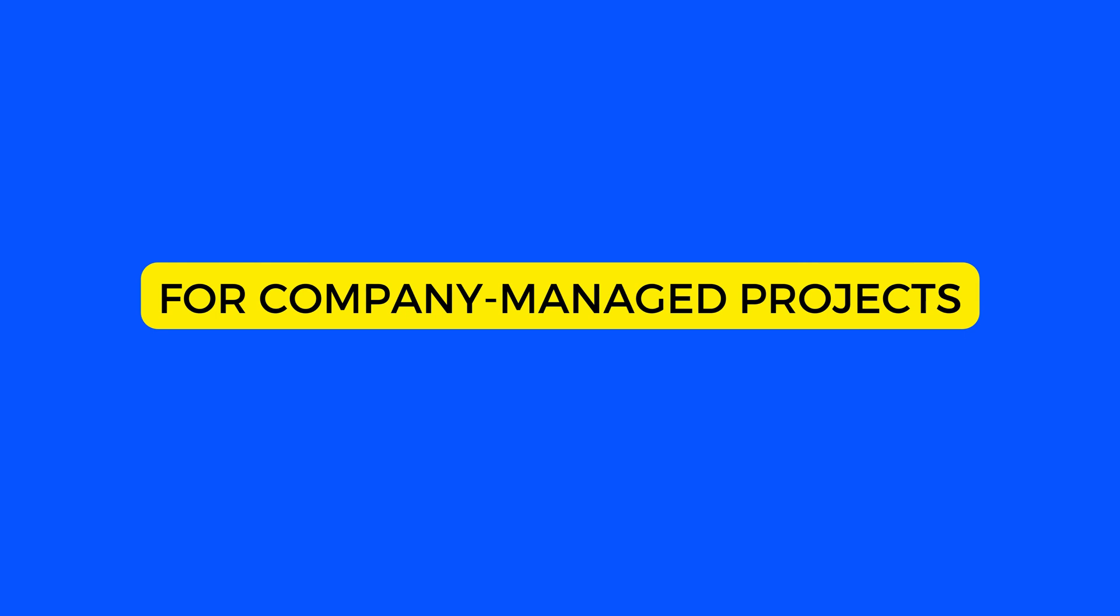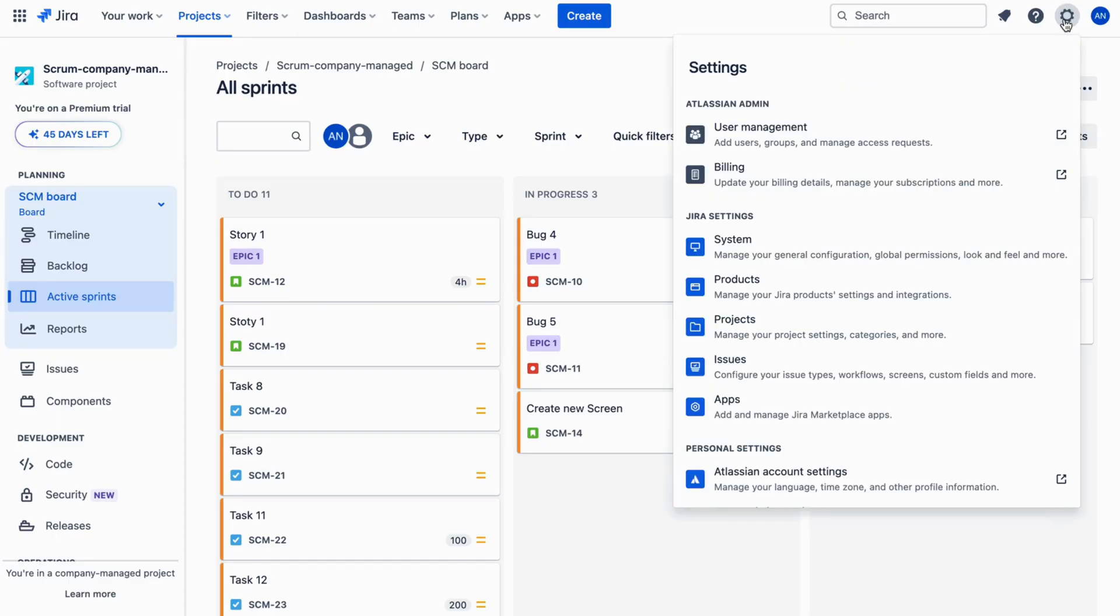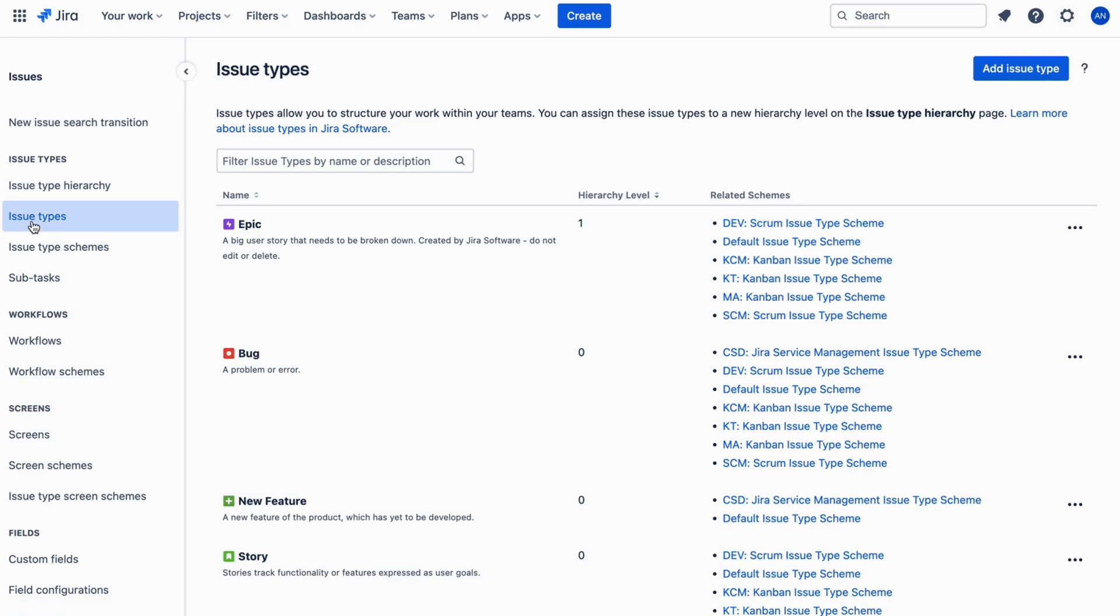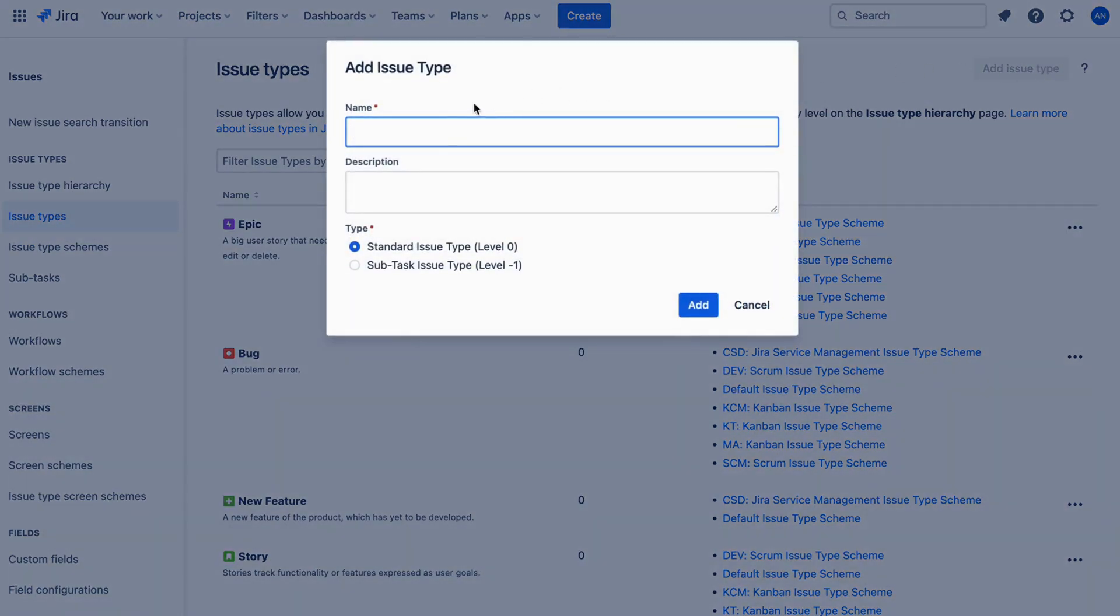For company-managed projects, go to Setting, choose Issue. Then in the left-side menu, choose Issue Type. Click on Add Issue Type. Enter Name and Description.